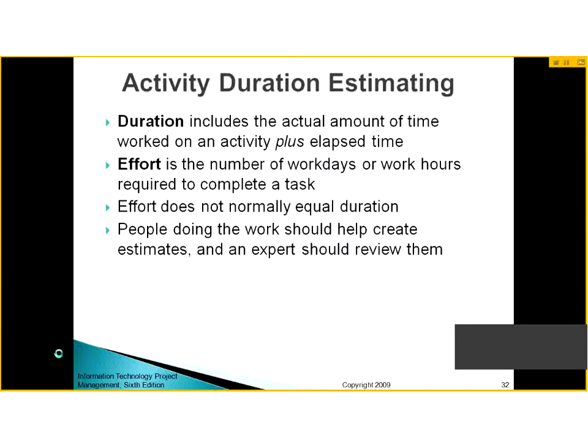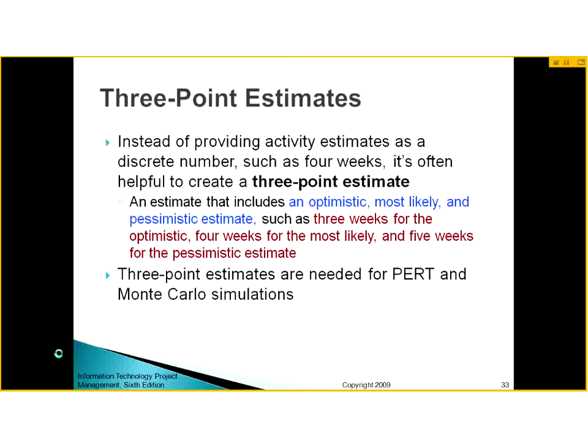So effort is the number of work days or work hours required to complete a task. Effort does not normally equal duration, and people doing the work should help create estimates so that the difference between duration and effort is the minimum. Instead of providing the duration estimates ourselves, it is better to involve the team in this process, to involve the people who will actually be working on that activity.